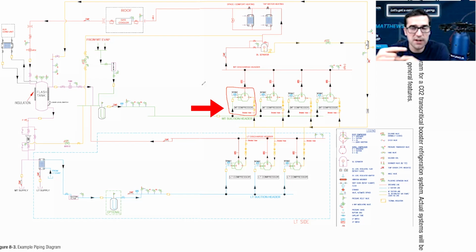So you start up a percentage of the load. That's going to be in the manual. It's going to tell you what percentage. Kaiser Warren's going to say, we want, start with this. It could be 3 circuits, could be 25%. It could be getting all 100% of the medium temp up running before the low temp at all. And as a startup service technician, you're going to learn the way you can do it the most efficient, effective, and safe way you can do it.